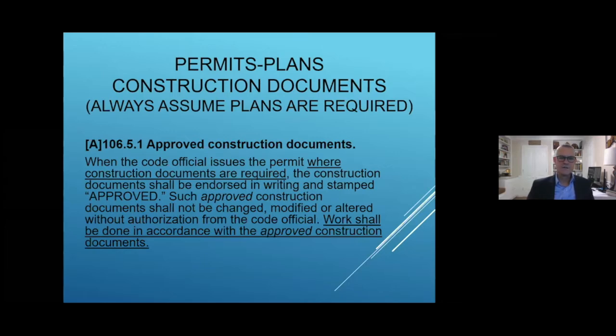And then it says, one of the biggest issues at the bottom that we would run into in code enforcement is you have a set of plans on site. Unfortunately, the work didn't get done in accordance with those plans. That almost always is going to create challenges, headache, and more than likely a delay in the job, because either the work is going to have to be altered to meet the plans, or you're going to have to go back and alter the plans to meet the work that's been installed, to whatever extent the alteration is different from those documents.